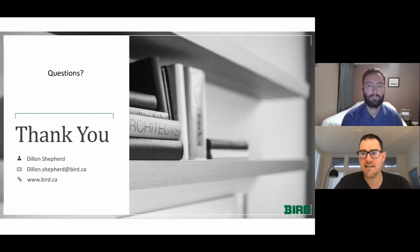Yeah, for sure. So the question that was asked that deleted itself but is now back in the chat is, how much expertise in Six Sigma, TPS, or the like do companies need to implement lean construction in your opinion? How do we get it to that level? That's one I don't have a good answer for at this point. I don't know a ton about Six Sigma, but the continued use of VDC, as far as I'm concerned, will flush out a lot of the lean principles as well. Because VDC is such a visual tool with a lot of data, a natural outcome is that people can understand the shortfalls of a schedule. Scope gap is a common thing that I see, or a gap in a schedule where there's no planned activities, but we can see the model elements showing, hey, look, we have these objects that we need to figure out how they're going to get installed in the building, but we don't have a schedule placeholder.